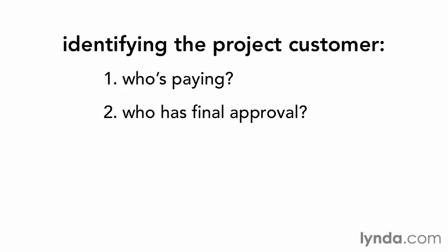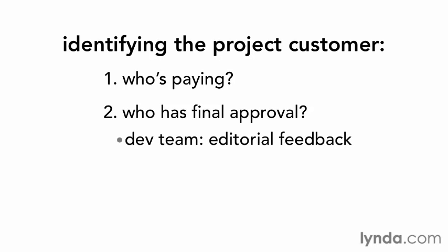When funding and approval aren't connected, approvals typically come from the project customer. I experienced this situation with a software development group that hired me to write documentation. The development team reviewed the documentation I wrote, but the director of product management approved the final documentation, including the content, format, and delivery method. She was the project customer.